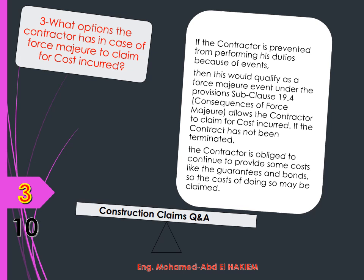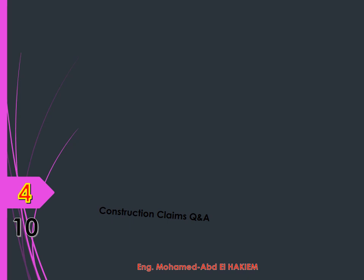If the contract has not been terminated, the contractor is obliged to continue to provide some costs like guarantees and bonds, so the costs of doing so may be claimed. The situation would probably provide sufficient grounds to claim for an extension of time and the recovery of any costs incurred. FIDIC provides entitlement to the contractor to claim, as this is an employer's risk.